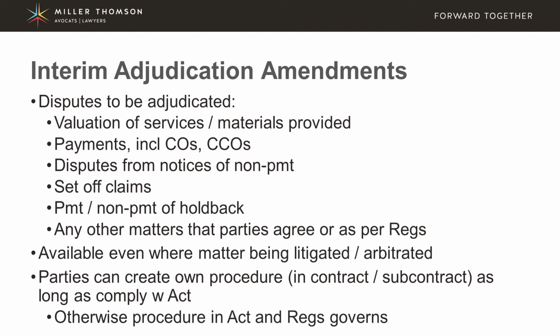There is some flexibility with respect to the procedure for adjudication, and the parties can set out their own procedure in their contract or in a subcontract, but it has to comply with the Act, so it can't be completely different than what's set out in the Act. If this is not included in a contract or subcontract, then the procedure set out in the Act and the regulations will be what governs this adjudication process.